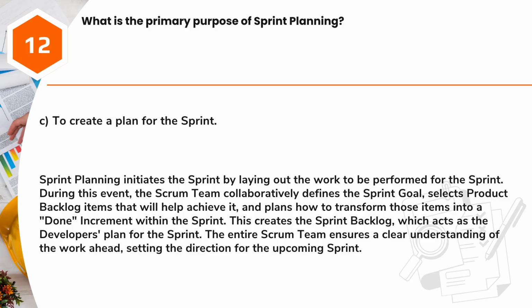and plans how to transform those items into a done increment within the sprint. This creates the sprint backlog, which acts as the developer's plan for the sprint. The entire Scrum team ensures a clear understanding of the work ahead, setting the direction for the upcoming sprint.